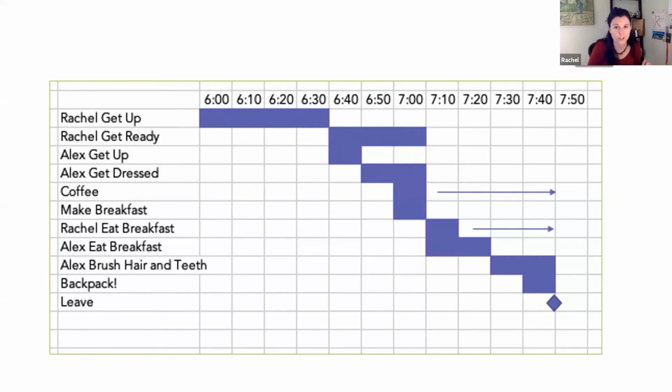I cannot even tell you, because if this was a house build and it was over a 6-month project, I could look, let's say down here, and say, finished plumbing needs to happen in October, the second week in October. And it might be May now. That's hugely beneficial for you, because then you can tell your guys, I don't need you till October. In September, I'll touch base with you. It is massively beneficial to understand what the long-term human commitments are.